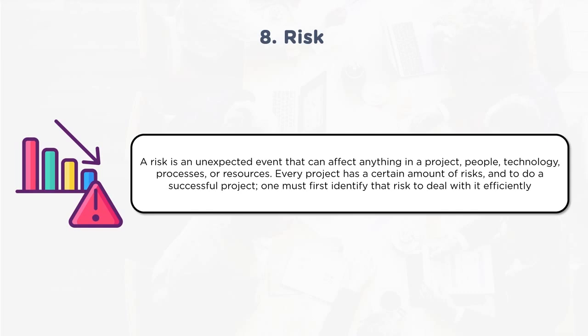Now, in the current scenario, everywhere in the projects, what you observe closely is that people tend to look at the risks which are threats, that is negative only, but they fail to recognize the risks which are opportunities, the positive risks. Another gap which we see in risk management is that it is done in the initial phase of the project. As the project is kicked off, someone will do the risk assessment and have a list of risks identified, but unfortunately there is no categorization for that risk, and how it is going to impact the project is not clear. Thirdly, the list of risks is created only once. It is not done repeatedly.